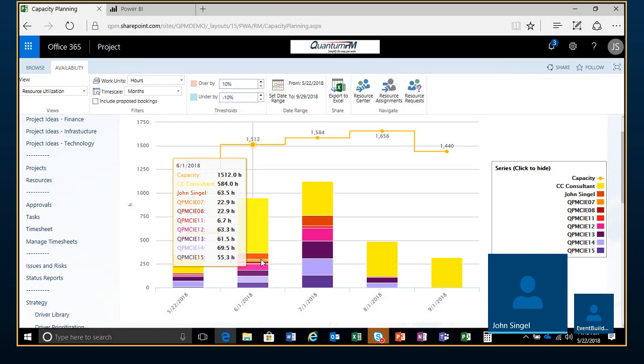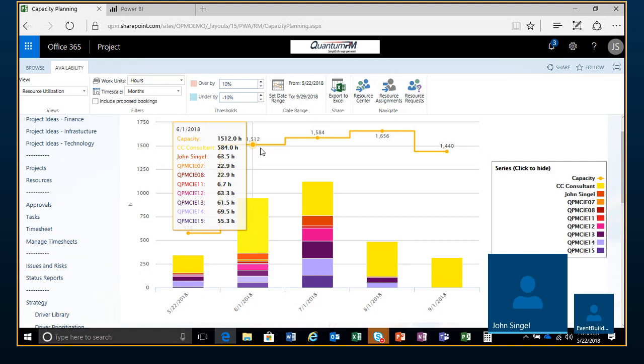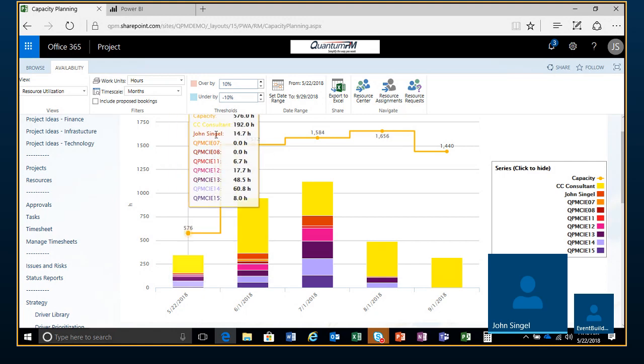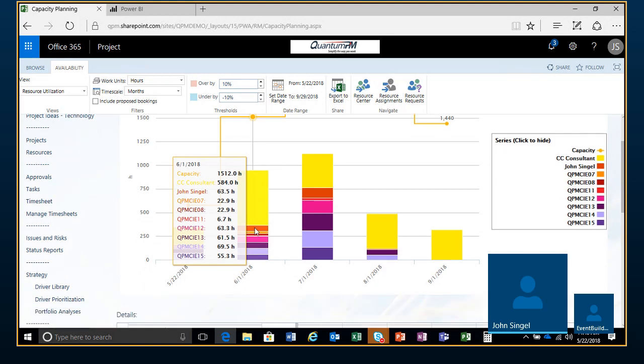So then I would go back and say, okay, what's this? This is again part of the puzzle. You have to figure it out and say, okay, based on who's doing what here, who's contributing to the problem. And what this would tell me is, since I've got the month of June, I would know about 168 hours of available work, right? It's 4 weeks times 40. It's about 160. It comes out to 160, 168. So I would know that to begin with, and I would say, okay, this guy, CC consultant, is wildly overallocated, but these other ones, I've got availability. So this can be useful to make a determination as to where I want to reallocate some of the work and labor to other folks within the group.